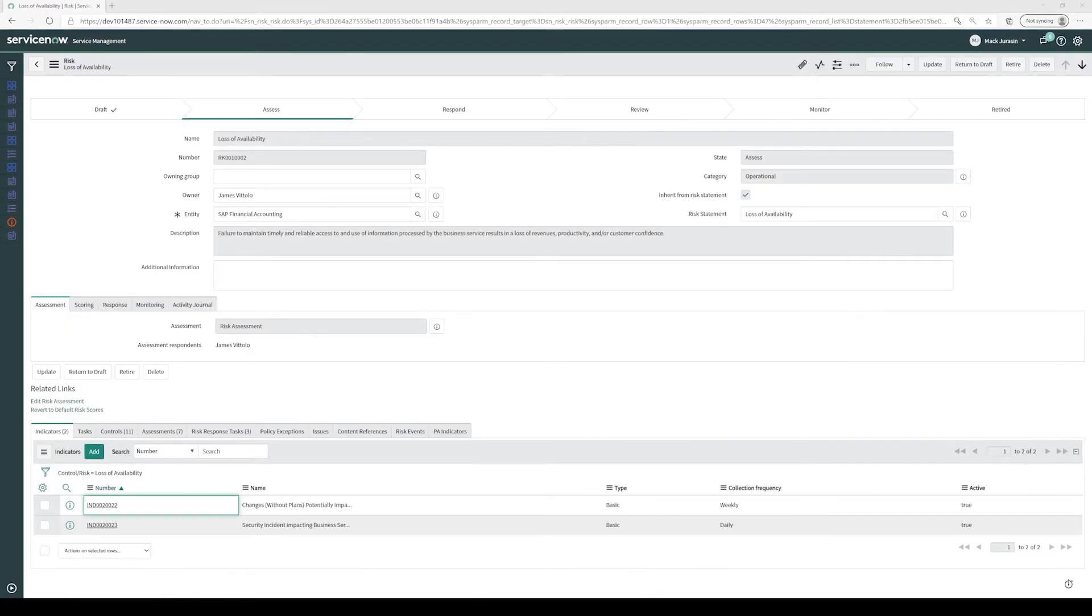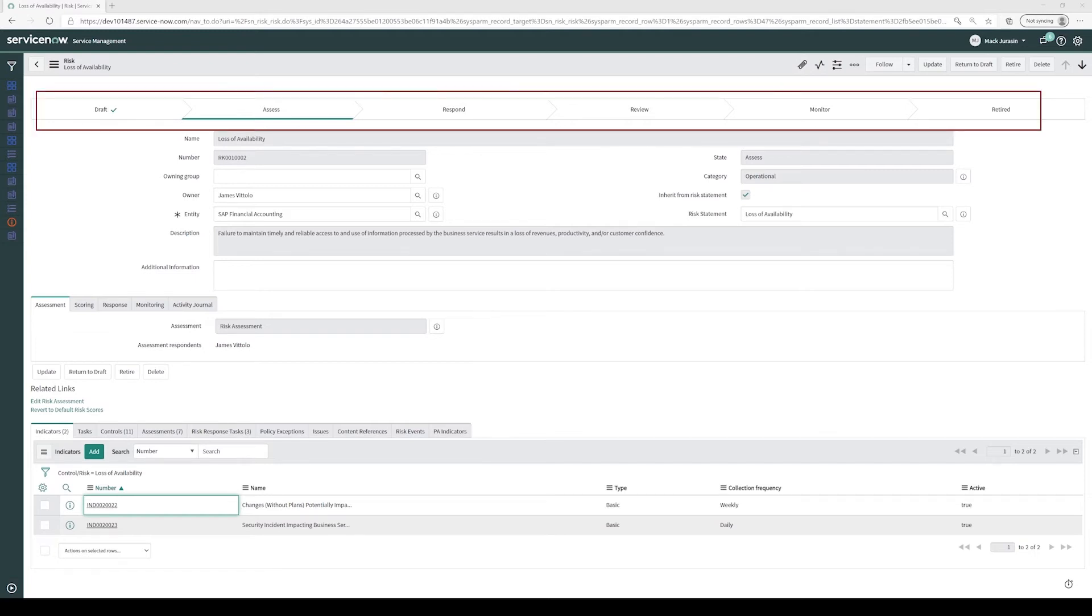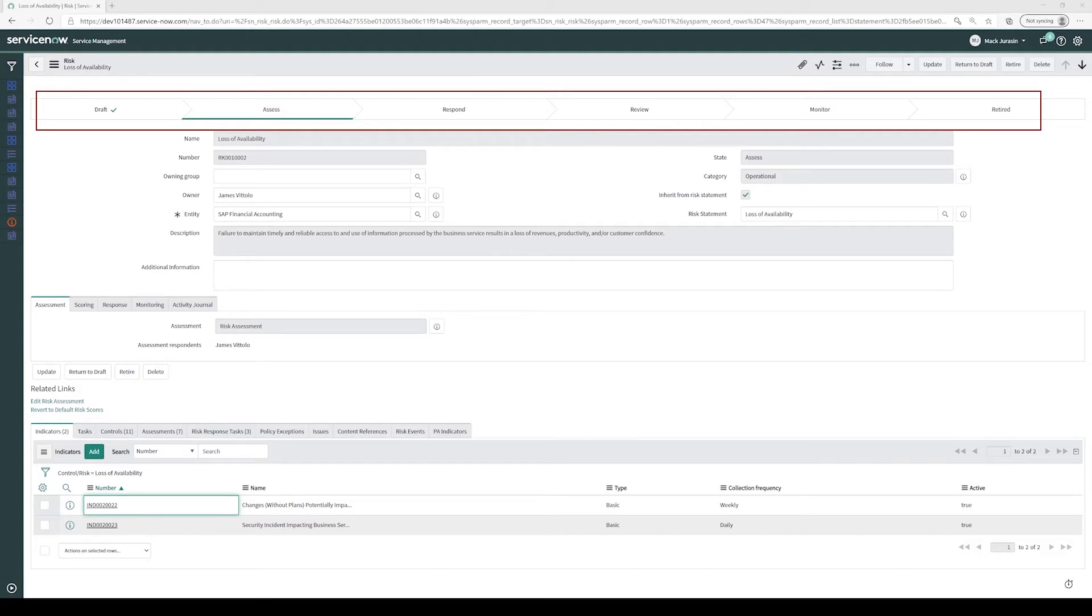Back to our risk of loss of availability for the SAP Financial Accounting entity. If we look at the top of the screen, we see the chevrons indicating the lifecycle of our risk. Our risk starts off in a draft state and then moves to Assess where our risk owner completes a risk assessment. Once our risk owner has completed their risk assessment, our risk moves to Respond where our risk analysts determine how to respond and score our risk. Once we have determined the appropriate response, it moves to a Review state and our risk managers validate the response as appropriate. After our risk managers have completed their review, our risk moves to the Monitor stage and we begin active monitoring. Finally, at the end of the risk's life, it moves to a Retired state.